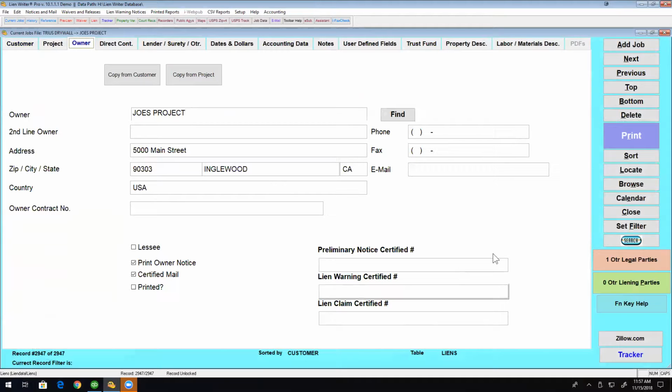If it's a preliminary notice, it doesn't matter. As to a mechanics lien or a release, that's a gray area. I know people that do it. I've never heard anybody get any complaints about it. The law says it must be signed. If a stamp signature is deemed legal in that state, no problem.